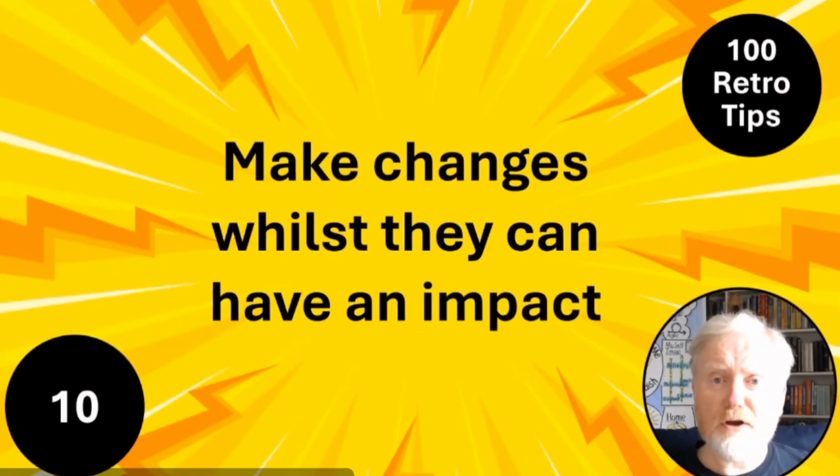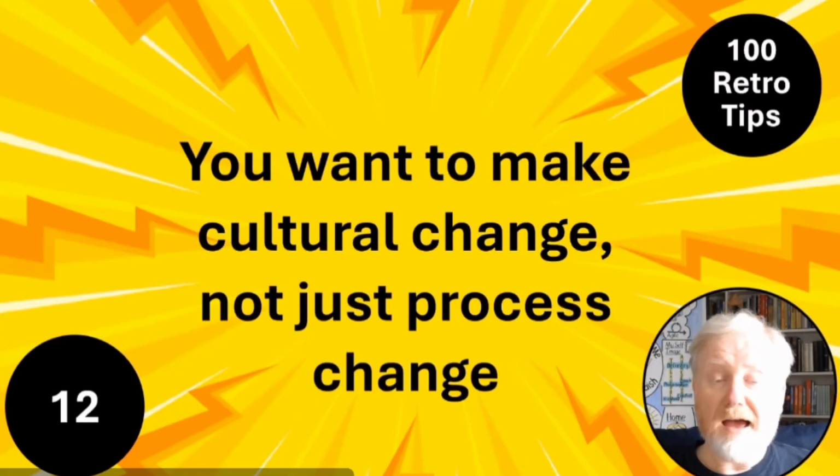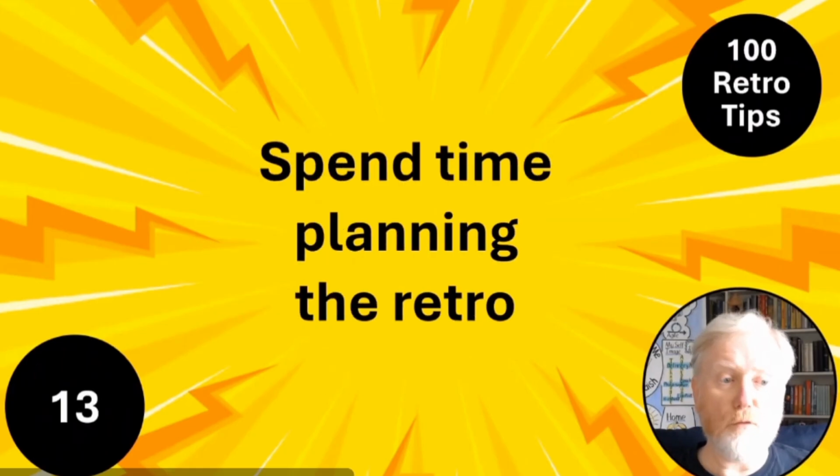The advantages of retros: they add value where there's still chance to change things, unlike doing a lessons learned from traditional project management right at the end where it's too late to change anything. You have to explain that to your team to get their buy-in. Why are you doing this? We're doing this to be better. And the focus needs to be on cultural change, not just on process change, getting them in a growth mindset to want to innovate, to change, to improve all the time.